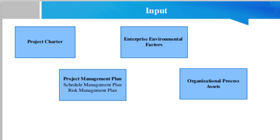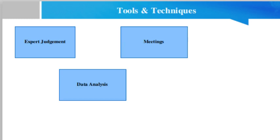The organizational process assets that can influence the Plan Cost Management process include: financial control processes, time reporting, required expenditure and management processes, management reviews, accounting codes, standard contract provisions, historical information and lessons learned repository, financial databases, and existing formal and informal estimating and budgeting-related policies.